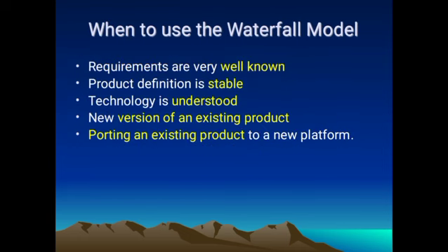When to use the waterfall model. Requirements are very well known. Product definition is stable. Technology is understood. New version of an existing product. Porting an existing product to a new platform.